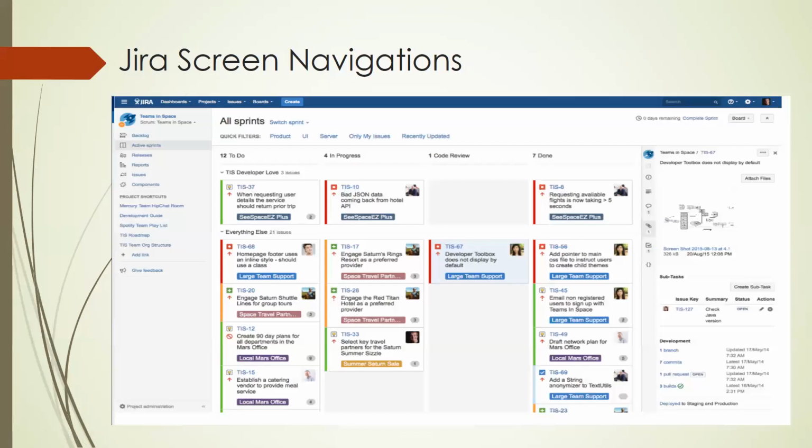Yes. Understood, sir. Okay. Next is Jira screen navigation in terms of the sprint. So we all know when we are working on the sprint, there are a lot of user stories, right? We will work on multiple user stories. We will give PV value, CP value, and many things happen. How is it getting assigned to the developer team? We use the Moscow technique over there to figure out which is the must and the most important. So what happens when you are assigning this? We will not give them on a piece of paper or something. Rather, this will be done in the Jira application itself.